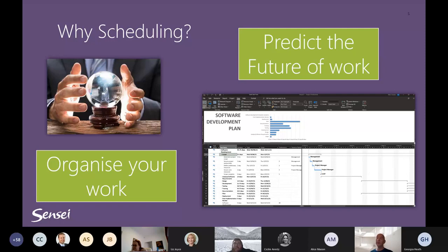And quite often these are organizations that engage external vendors that actually manage the schedule for them. So project managers are then often contract managers that agree to certain key dates or milestones as their deliverable, and therefore they don't maintain their own schedule. So it does make sense in many ways.